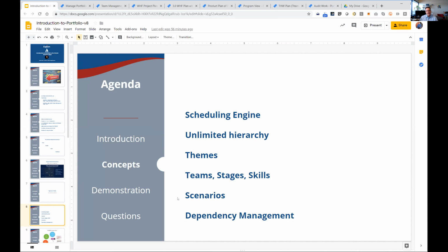So another key concept that's really becoming mainstream in the Atlassian ecosystem is this idea of an unlimited hierarchy. They've done a great thing. Originally there was this epic link idea where epics had stories that were a part of them. And this epic link field was very powerful in terms of building that relationship. Well, now we have a parent link field, and that parent link field can be used to develop an unlimited hierarchy of issues. So you can have a 12-layer deep hierarchy.